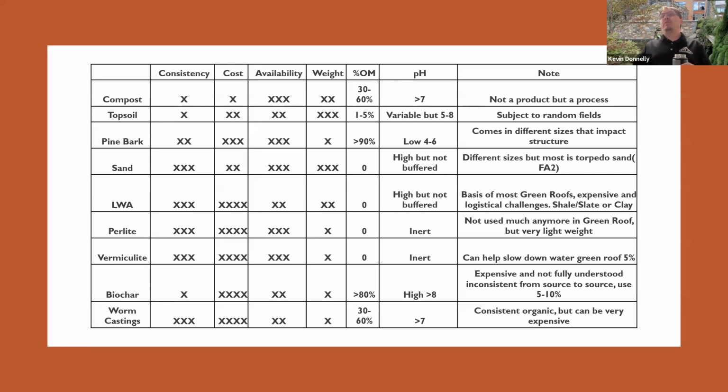So you have to manage the expectations of how much things are going to cost, how far they have to travel, all the freight components of it as well, what packaging you're going to use, and how you're going to get it on the job site. If it has to be moved with a crane, when's the crane going to be available? All those timing and logistics issues become very important for a lot of these projects, because if you want a topsoil blend in January, you're not going to get it because the weather is bad, right? We don't have stuff just sitting ready to go. Whereas a green roof might be available because those aren't going to be freezing in the ground, right?